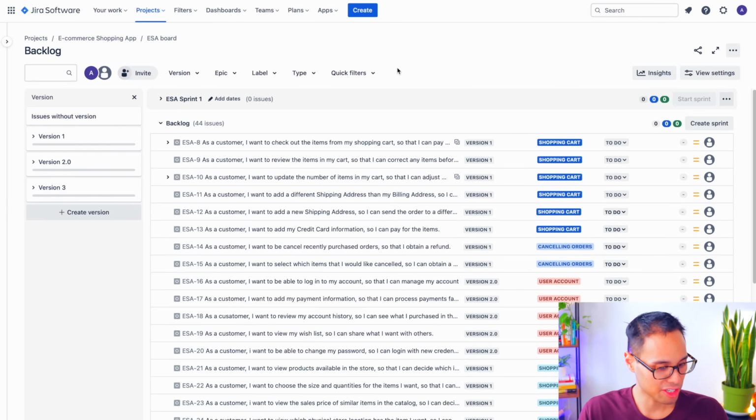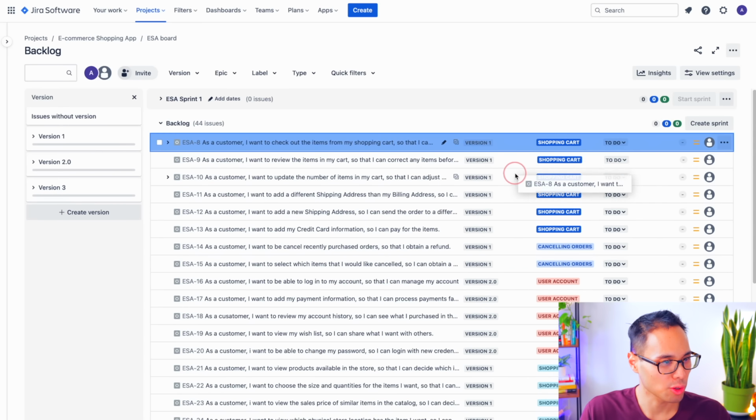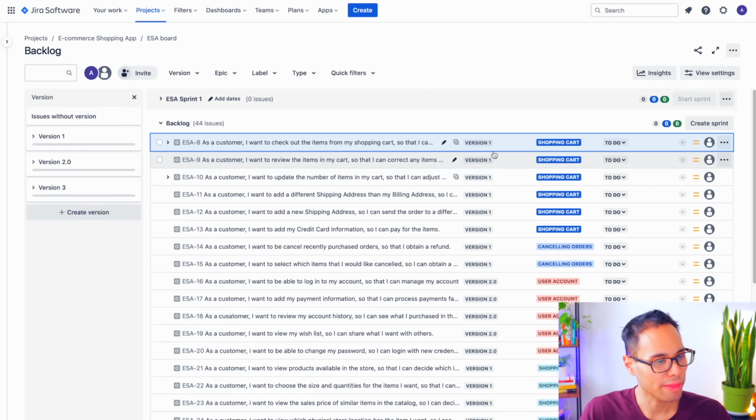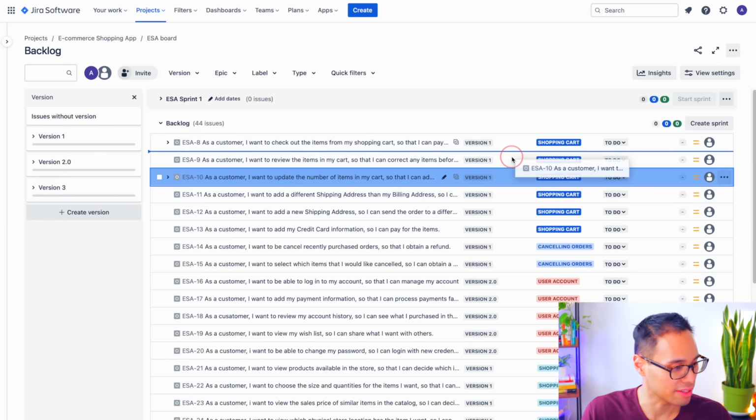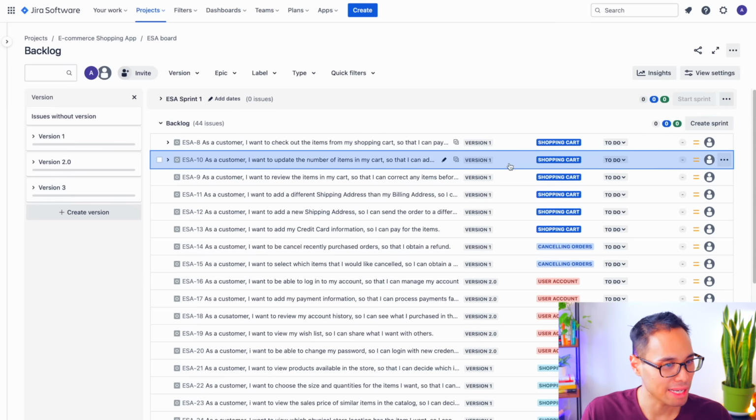So going back to Jira here, you put your full list of work inside of this entire backlog, and Jira allows us to drag and drop each issue, whether it's a user story or a bug, into the appropriate order. And in doing that, we're changing the priority of each issue. So for example, if I drag and drop the third user story above the second one, then that means that it has a higher priority than the one we pushed right below it.